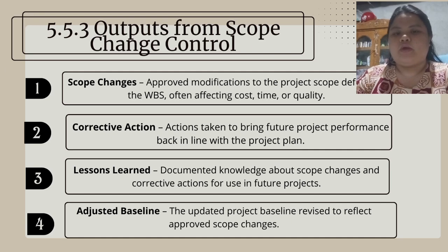Lessons learned. Documented knowledge about scope changes and corrections for use in future projects. Example, recording that delayed approvals cost schedule slips, so future projects include faster approval workflows.